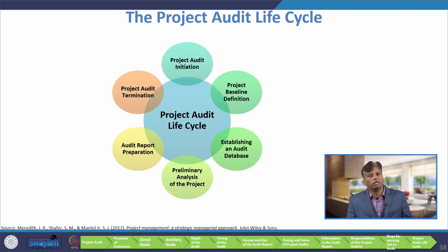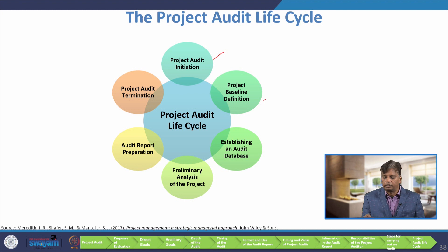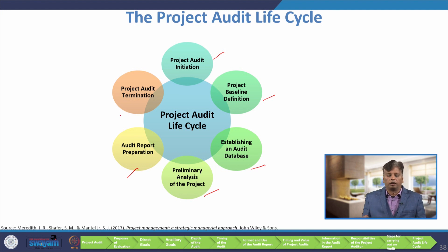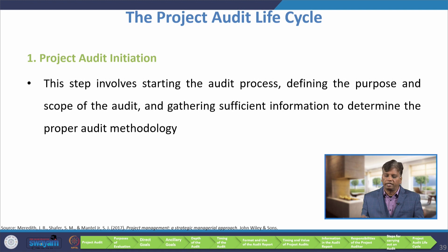Finally, we will discuss about the project audit life cycle, because the project audit is a routine activity. The stages are: project audit initiation, project baseline definition, establishing an audit database, preliminary analysis of the project, audit report preparation, and project audit termination. The first stage, project audit initiation, involves starting the audit process, defining the purpose and scope of the audit, and gathering sufficient information to determine the proper audit methodology.